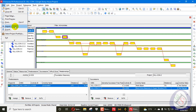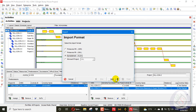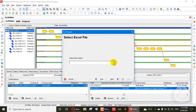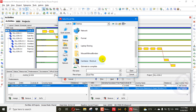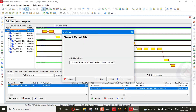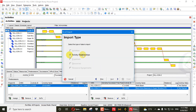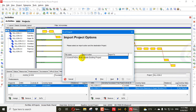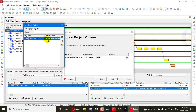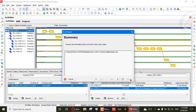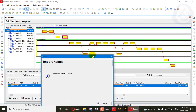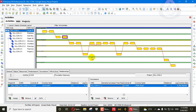I go to Primavera and import the background XLS file. Next, go to the desktop where the file has been saved. Select the construction file, then Activity Relationship, update existing project, go next, select the project, next, finish. When we finish, you will see there will be deletion of your relationships.